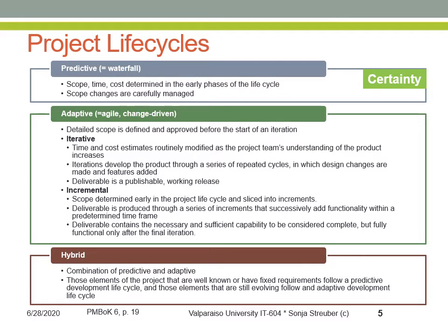However, what happens if our client does not exactly know what they need, or if we're building something completely new that is in some ways explorative? Then we have a higher percentage of uncertainty in our project. That is where a more change-driven, adaptive model might be more appropriate to use. This change-driven, adaptive model is sometimes called the Agile model, sometimes it's called the iterative model, or in some cases just Scrum, which is one of the methods used in an Agile environment.